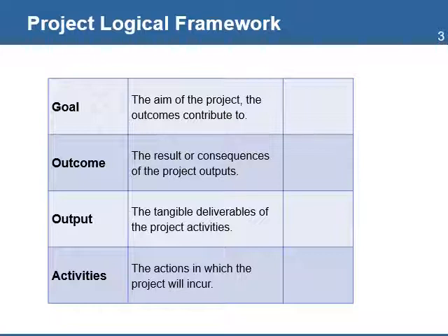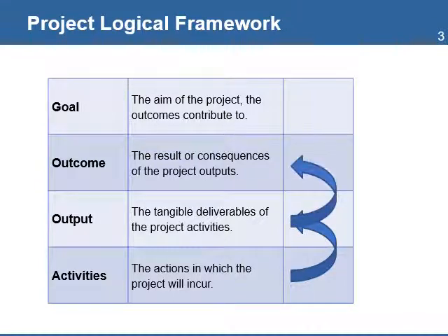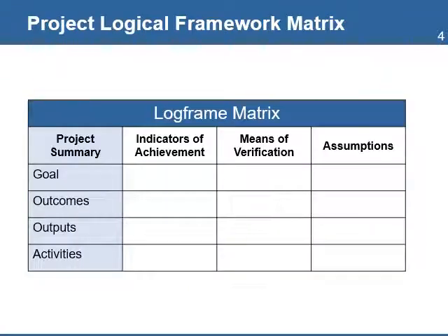The activities lead to the tangible outputs. The outputs lead to the project outcomes, and the outcomes contribute to the project goal. The Logical Framework matrix takes the form of a 4x4 table.